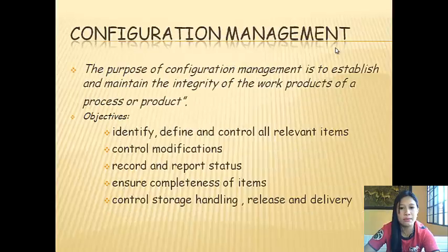The configuration management. The purpose of configuration management is to establish and maintain the integrity of the work products of a process or product. The objectives: first is to identify, define, and control all relevant items. The second, control modifications. The third is to record and update report status. The fourth is to ensure completeness of items. And the last is to control storage, handling, release, and delivery.